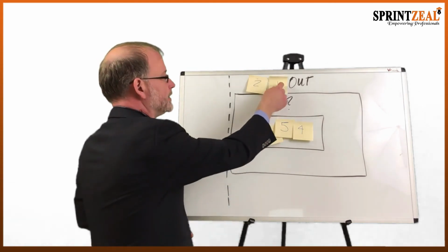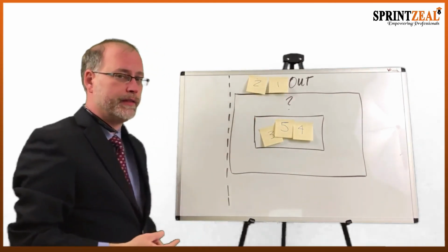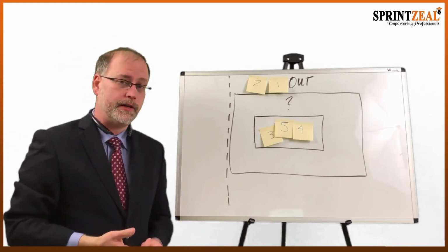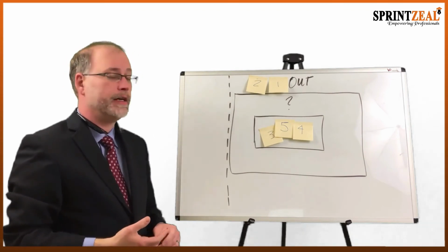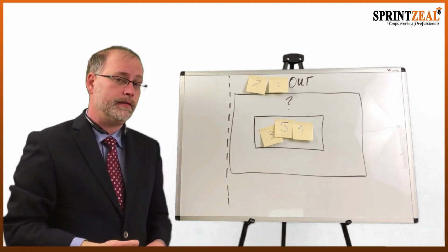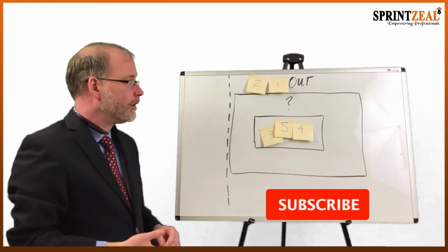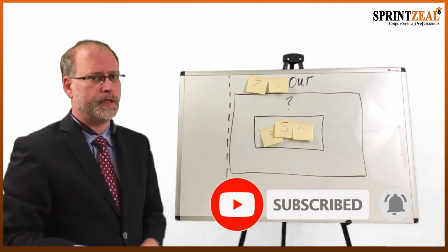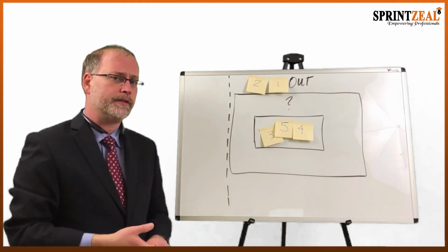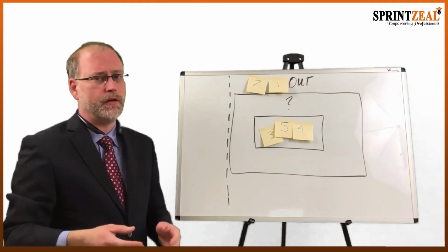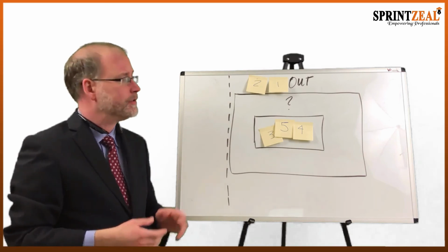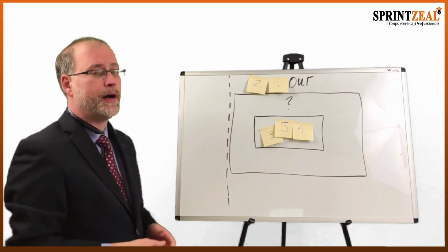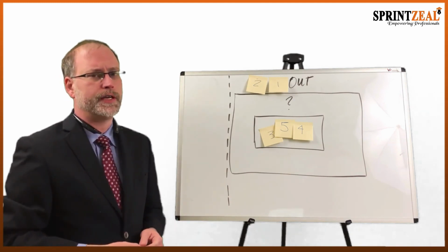Scope creep is going to do one of three things. It's going to require that we need additional time to complete our project. It's going to require additional resources or money to complete our project. Or it's going to require us to reevaluate the entire scope of our project. If any one of those three things doesn't align with the other two, it's called scope creep. So this is a great example of how we can use a really simple tool such as a whiteboard and 2 boxes to have a really healthy conversation around scope.